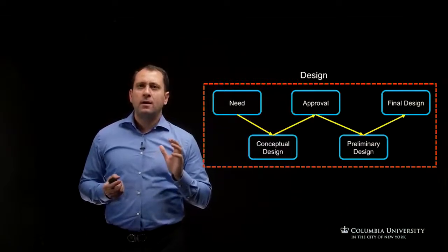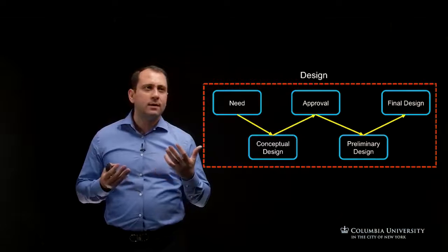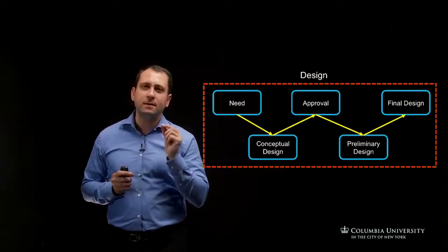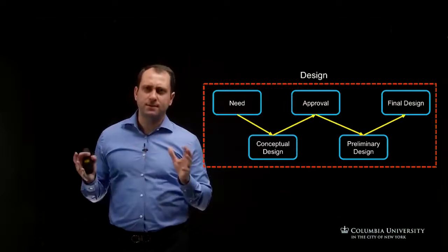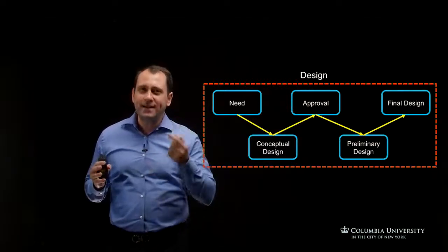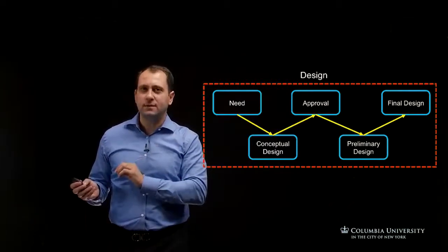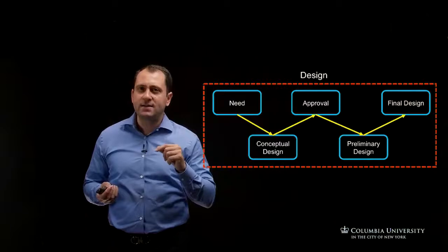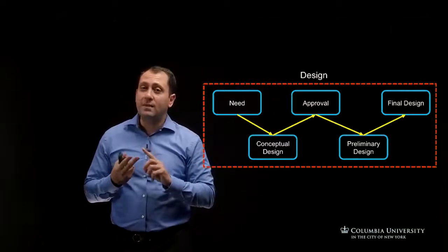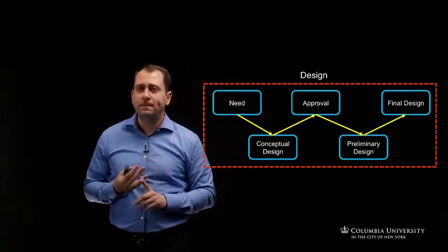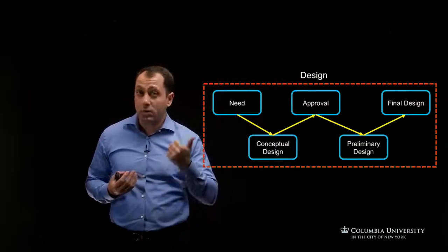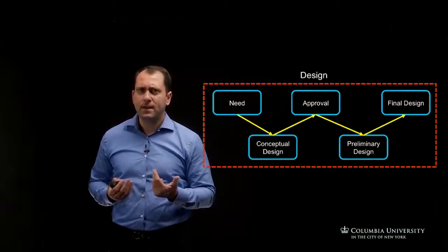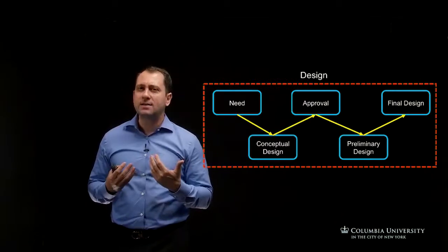So one, at the need and the conceptual design phase, the economic basis for the project must be established based on market studies, where we will be projecting the demand in using the project. Sometimes we also consider in this kind of study topics such as site location, availability of labor, and even availability of supporting resources like energy, power, water, and even shipping connections to deliver the materials to site. This type of study we usually refer to as a feasibility study.